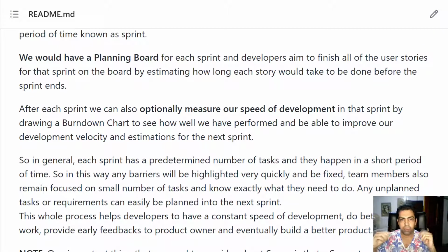So, generally speaking, you have a huge project, you cut it down into pieces and take care of each piece in a single sprint. In a single sprint, you have different tasks that need to be done by the end of the sprint, and each sprint, which is a short period of time, can be, for example, a week or 2 weeks.